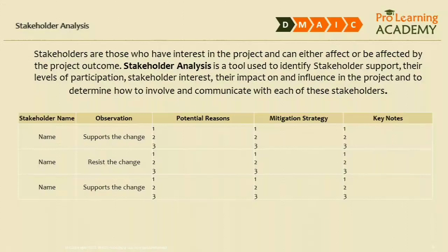Stakeholder analysis is a tool used to identify stakeholder support, whether they will support the project or they will be against the project, their level of participation, their level of interest, their impact on the project and influence in the project. And it will also be used to determine how to involve and communicate with them.